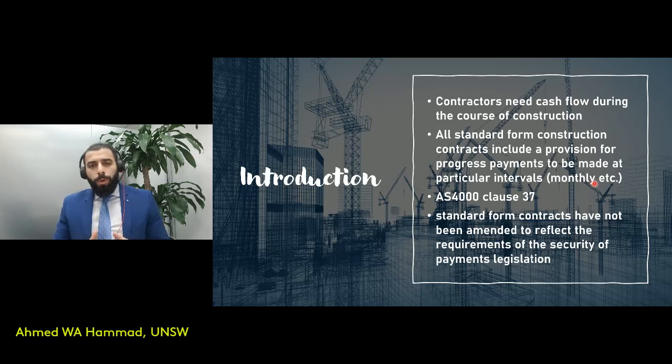There's one important point that we have to be aware of, and that is the fact that the standard form contracts haven't been amended to reflect the requirements of the security of payments legislation. So there will be provisions that specify certain dates for payments under the standard form contracts that are not in alignment with the Act. And in these instances, we always would comply with the Act rather than the standard form contract.